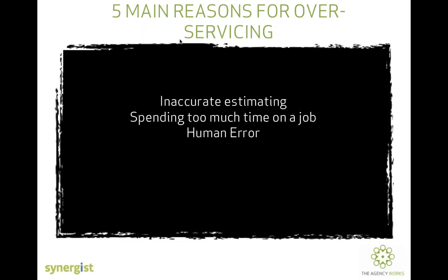So that will give you the ability to go back to your client and give the evidence and say, look, we've estimated this amount, actually we should be charging this amount. It may allow you to renegotiate. It may also allow you to look at things like, when we're building our estimates, maybe we should allow a few hours, maybe have a separate phase, a separate area of the job, to allow more hours for things like amendments. It might not be amendments, it could be a number of different things, but that's just an example. Also, using a different resource.